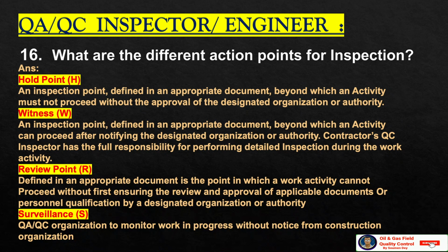Review point defined in an appropriate document is the point in which a work activity cannot proceed without first ensuring the review and approval of applicable documents or personal qualification by a designated organization or authority. Surveillance is where the QA/QC organization monitors work in progress without notice to the construction organization.